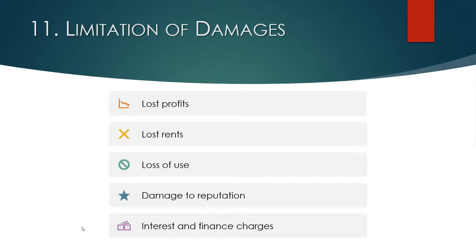Well, the money that the owner would have made for those days or months, however late the job is, those are lost profits that can be part of the consequential damages. And that could be really big numbers. It can be very unpredictable and very large damages that can have really disastrous consequences for you as a subcontractor if you're the cause of those damages.